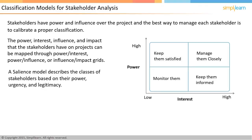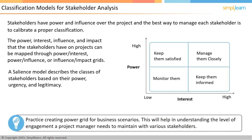The salience model describes classes of stakeholders based on their power — ability to impose their will — urgency — need for immediate attention — and legitimacy — appropriateness of their involvement level. This is a useful framework to guide the stakeholder management strategy on a project. Practice creating power grids for business scenarios, as this will help in understanding the level of engagement a project manager needs to maintain with various stakeholders.